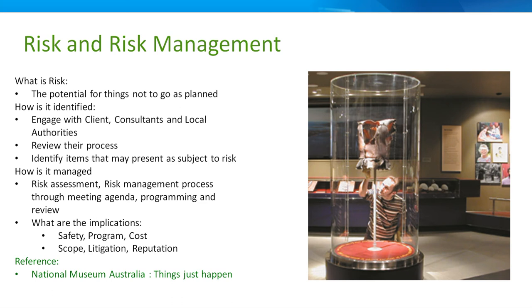And of course, the only thing that hasn't happened is the windows are not turning up. Because the window manufacturer has now been involved in a larger project, and his liquidated damages costs exceed the entire value of our project, like per week or something, so we're second fiddle. So in a day or two, I'll be ringing and talking with him and pleading and using every trick in the book. Can we just have some windows, 3 windows? Because we can't close up the building. There's about 20 windows we need, and he's working on multi-storey construction.